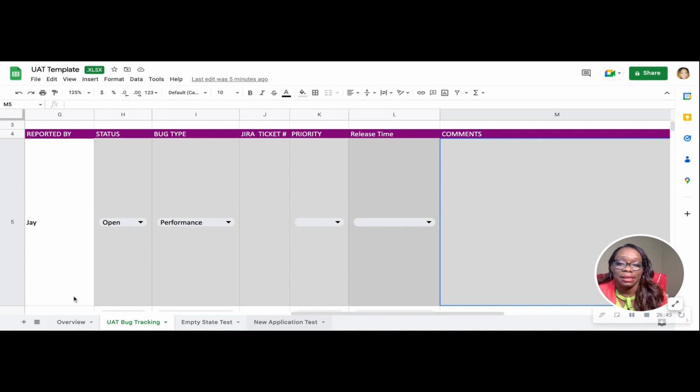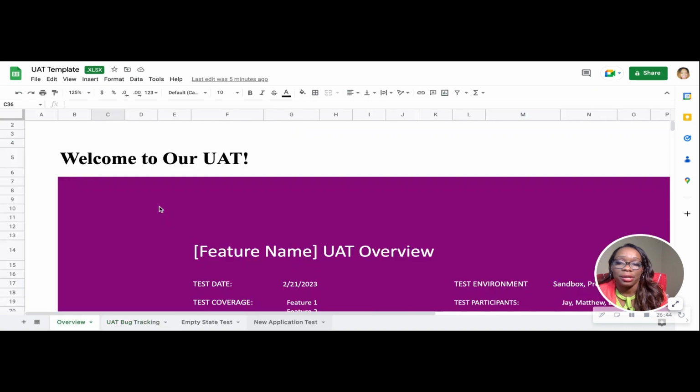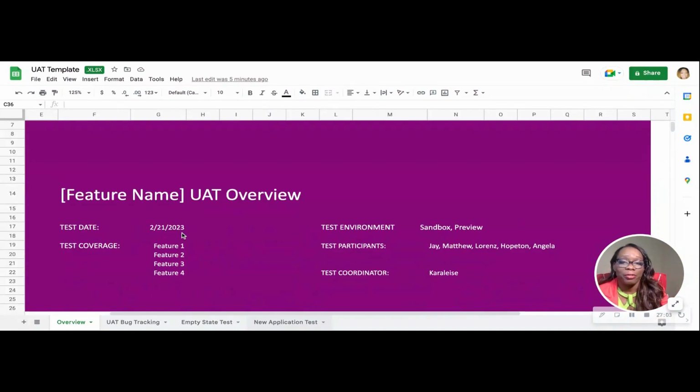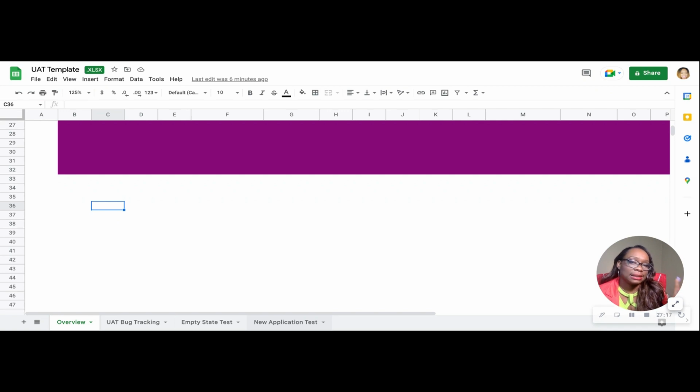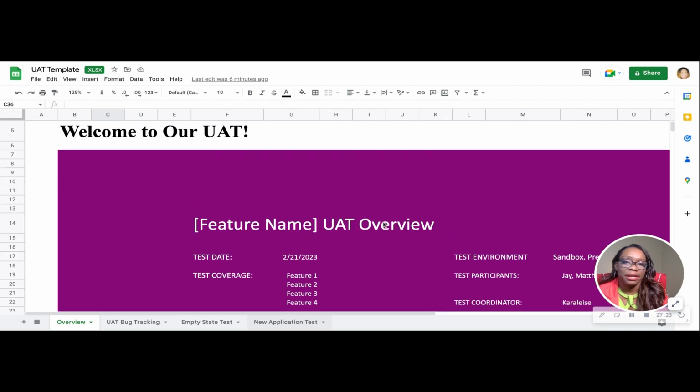And then you can do, like I said in the previous section earlier, that when you have all of those bugs, you can take some data out of the bug list, like how many bugs are open, how many bugs are fixed, how many bugs are deferred, how many bugs we are not going to do, how many bugs are pre-release, how many bugs are post-release. Those are good information to have. And then you create a dashboard for that. So when somebody comes on your overview page and they scroll down, they can see a dashboard here or here that shows exactly what we just talked about, right? So they don't have to go through each of the tabs and go through the whole list themselves to figure it out. You can create those calculations through Excel or through Google Sheets or whatever tool you're using and just populate it here. It'll be very easy for them to follow.